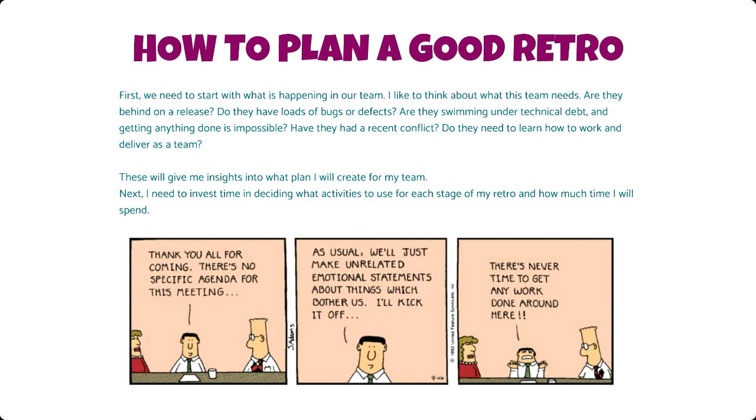So thinking about what needs to happen for a team is a great place to start. And then, once you know that, you need to invest some time. You need to think about, okay, cool, how much time do I have for my retrospective? What activities am I going to do for each of those stages? What are the time boxes that I'm going to give?